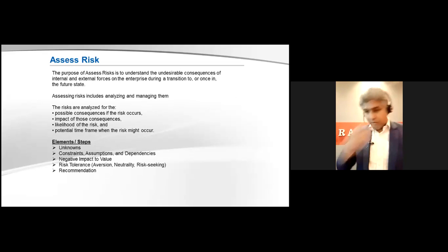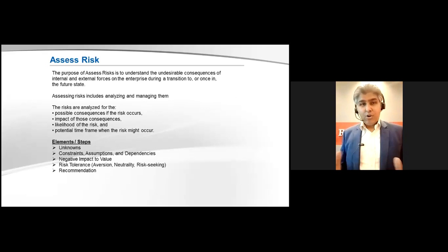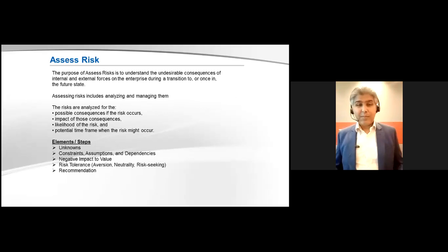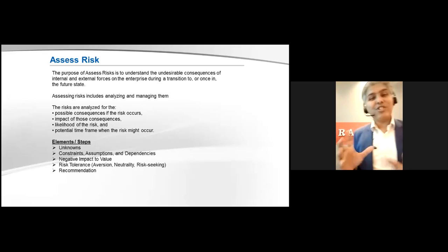So first of all, we have to understand what risk is. Risk is anything which is unknown. If you don't have an answer to it, that's a risk. Now that could be a small risk or a big risk, but it has to be a risk. Okay, and there is one simple Excel sheet where you just note down all the risks whenever you face a question and you don't have an answer to it. That's a risk.